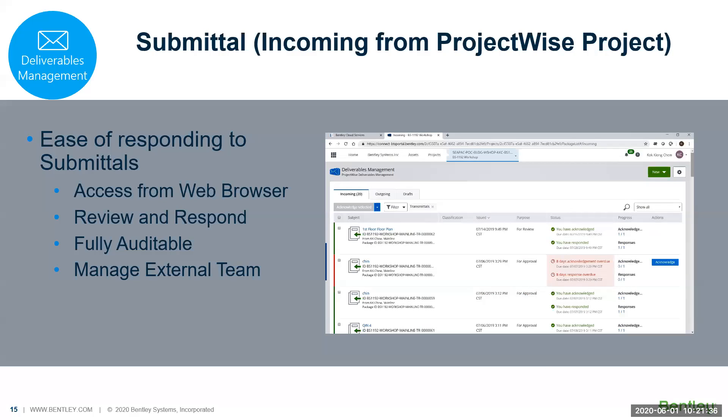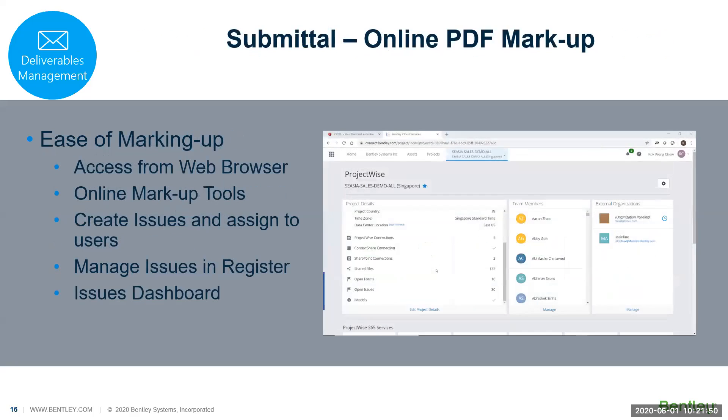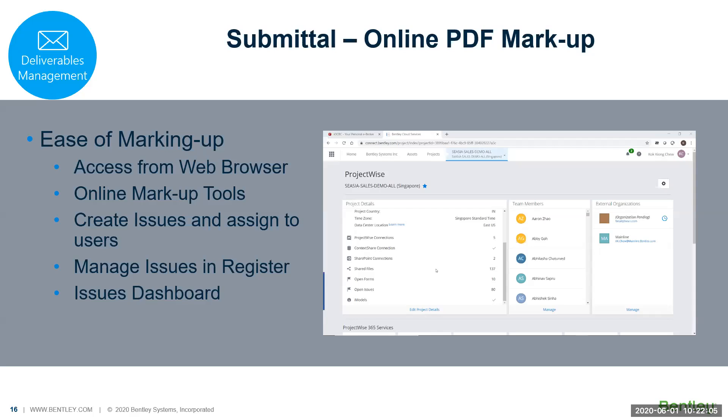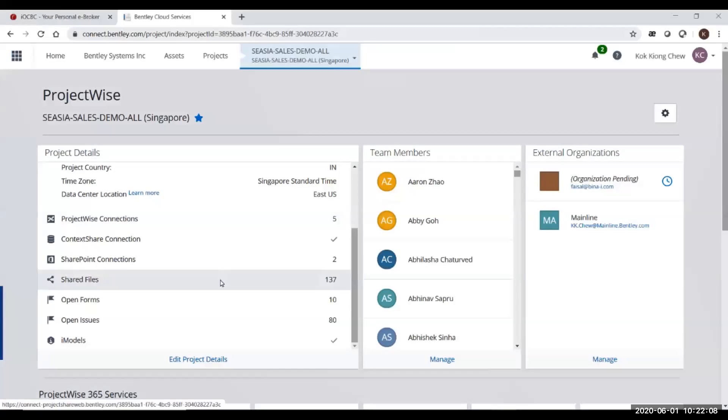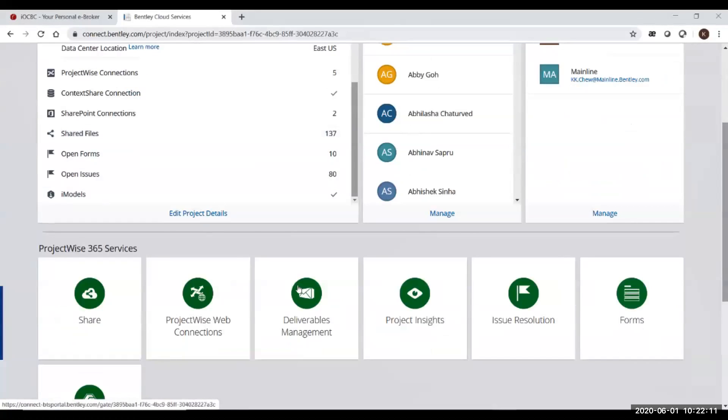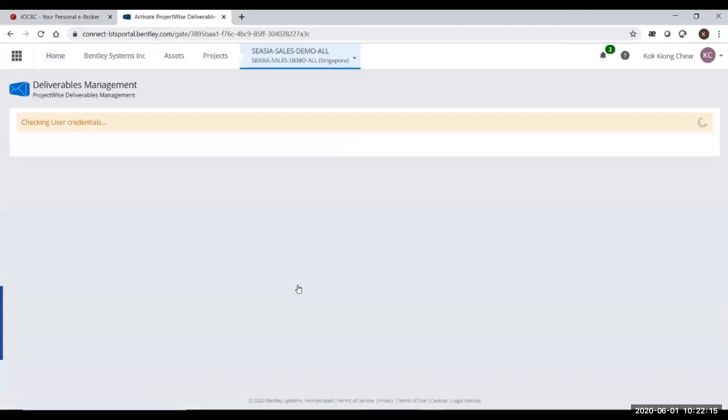This is a very simple and basic way of receiving and responding to your submittals. We have another way. If you are doing a PDF markup, you can actually markup the PDF files on the submittal itself. You don't have to download, print out, markup, scan, and re-upload. You can reduce that task.